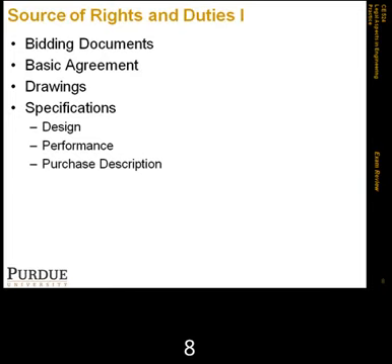We talked about design specifications being basically a prescription or detailed specifications. Sometimes we also call them materials and methods specifications, or detailed specifications. They tell the contractor exactly the measurements, the tolerances, the materials, the sequence. They basically explain in detail the material, its finish, and so on. So it basically prescribes what needs to be done.